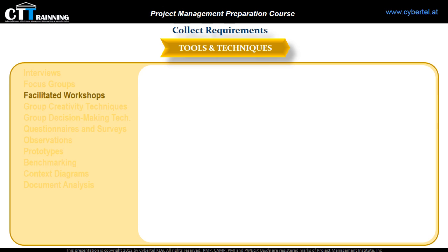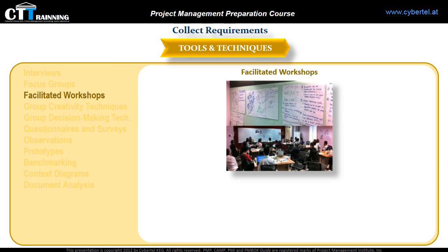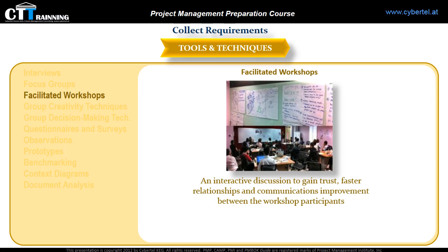The third technique is facilitated workshops. Collecting requirements is also conducted through facilitated workshops that bring key stakeholders together in an interactive discussion to gain trust, foster relationships, and improve communication between the workshop's participants. Facilitated workshops are the most used technique for defining cross-functional requirements and balancing stakeholder differences and expectations.